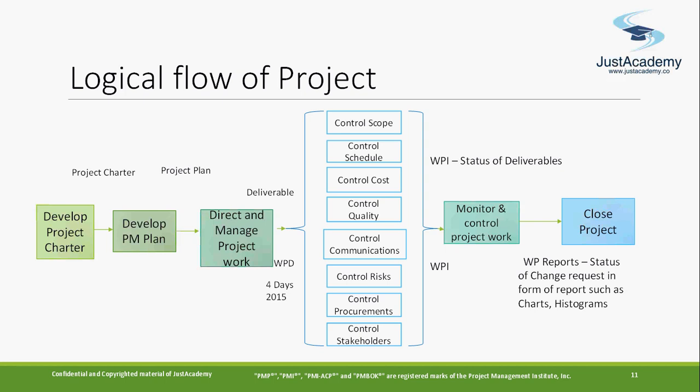Okay, because that's the deliverables. This is when I say the deliverables or some raw observation. Maybe I can say when 10 activities are planned and 5 things have been completed. But how much time is needed now? That's like you are going for a schedule. You say, hey, I need 2 more days to complete those things. So again, you are going to update your project management plan as part of that. So actual deliverables are called the work performance data. Is this clear?